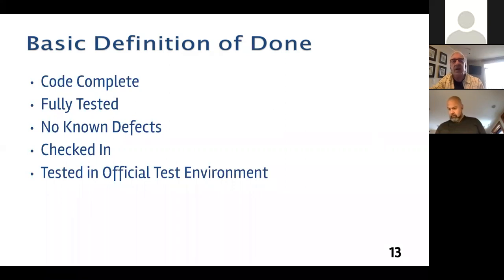It requires understanding what the purpose of the basic definition of done is, and then working your way through, incrementally over time, coming up with what we mean when it's really done. I can imagine in a content creation environment, one thing about the definition of done is it's actually been produced in our 4 standard languages. A random example, but that makes it a yes, we always do that. And you're not done when you've written the paragraph, but you can start to think about being done when you've written the paragraph and then translated it into the other languages, if you see the difference there.